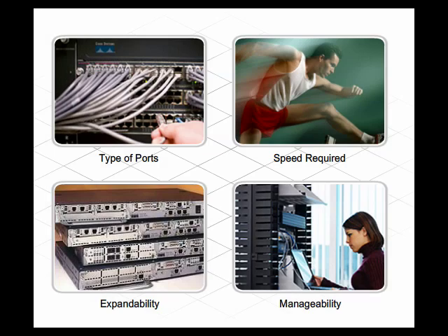Based on the information from the analysis report, the selection and design phase takes place. During this phase, prototypes are created and tested. A prototype is a good indicator of how the new network will operate. Prototypes are created in network simulation software such as Packet Tracer. When the design is approved by the customer, implementation of the new network can begin.